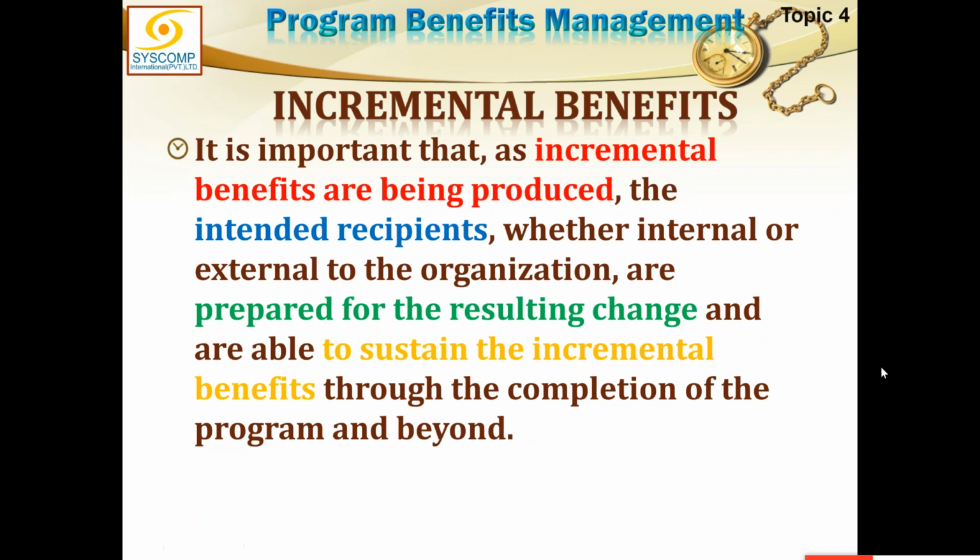Okay. So Frayal says a roadmap is a general benefits realization plan. Well, yes, you can say that, but as such, the term benefit realization plan is no more used in the fourth edition. We now call it the benefit management plan. But yes, roadmap gives us a very clear indication, an outline indication of when certain benefits will be realized. So that indication, if you want to call it the benefit realization plan, that is okay with me. But as such, benefit realization plan is no more a term used in the fourth edition.